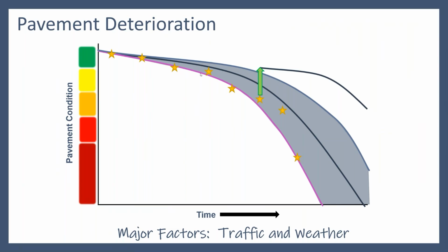Now, if I do that before the pavement gets to be in too terrible a condition, it's going to cost X amount. But if I wait until that gets worse, you see the length of the green arrow that's required to bring that condition back up to a satisfactory level. It's a bigger green arrow that represents a lot more money in trying to get that accomplished. There are a number of statistics out there, but in general, every dollar that you spend early in the pavement's life is going to save you a whole lot of dollars later in the pavement's life. So if you can do something to get that good condition, keep it in good condition, and do those small things that maintain or preserve the value, then you are way ahead in terms of budgets. The catch is we got to get it in good condition to be able to do that.